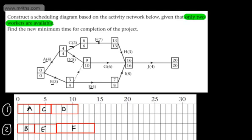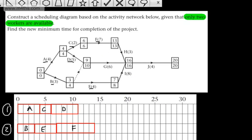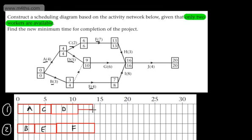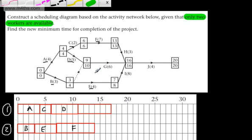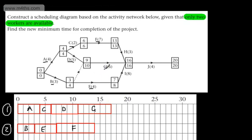At this stage Worker 1 is ready for the next activity. Looking at the activity network, I can allocate G or I — I can't yet allocate H because H requires F to be completed first. Despite G and I having the same late event time, I'm going to give Worker 1 activity G. Note that this scheduling diagram is not unique at this point. Activity G depends on the completion of B and D, and has 6 time periods. I add G to the diagram and mark it off.